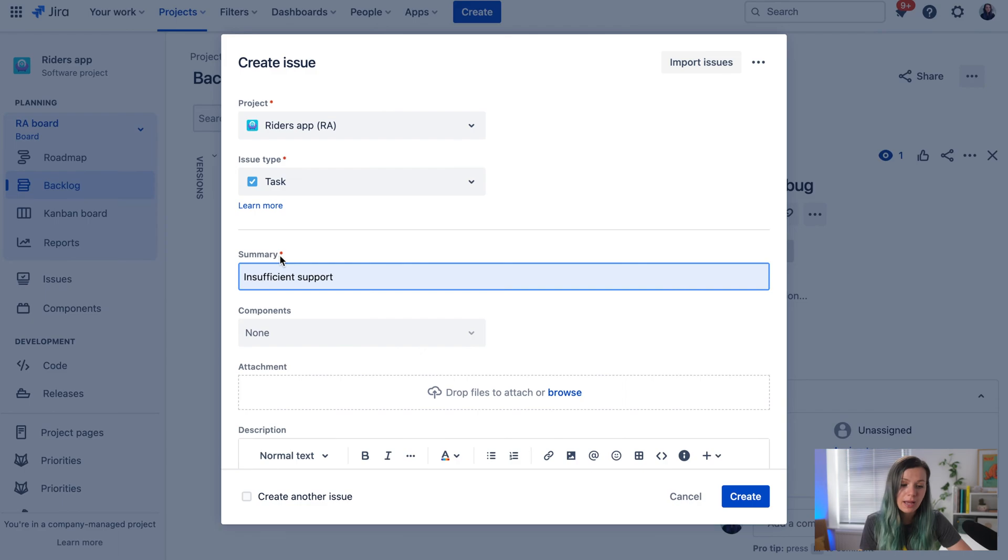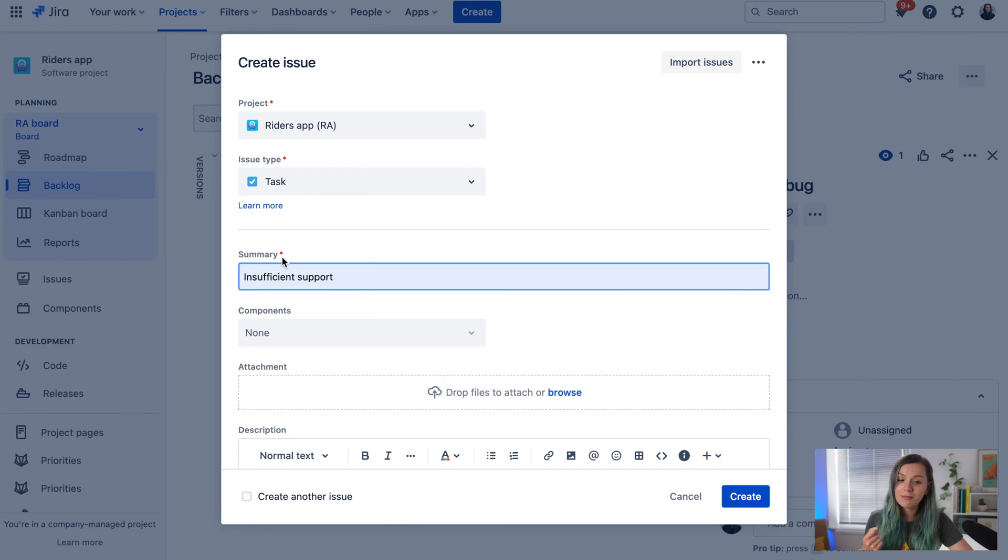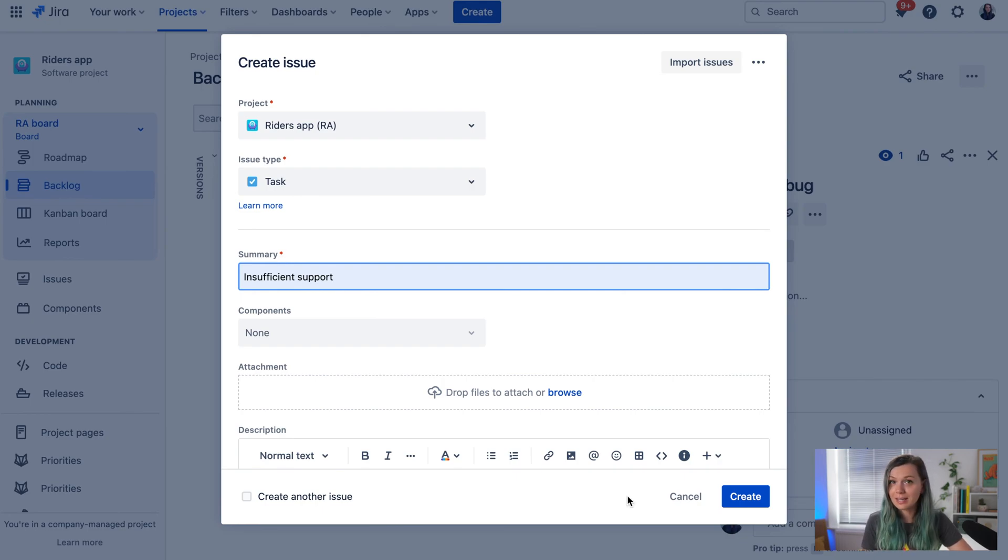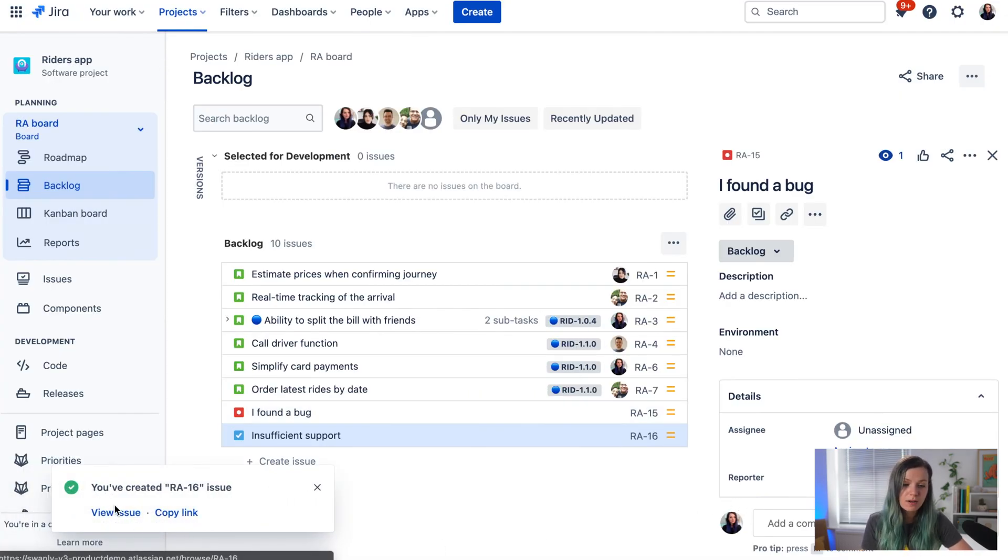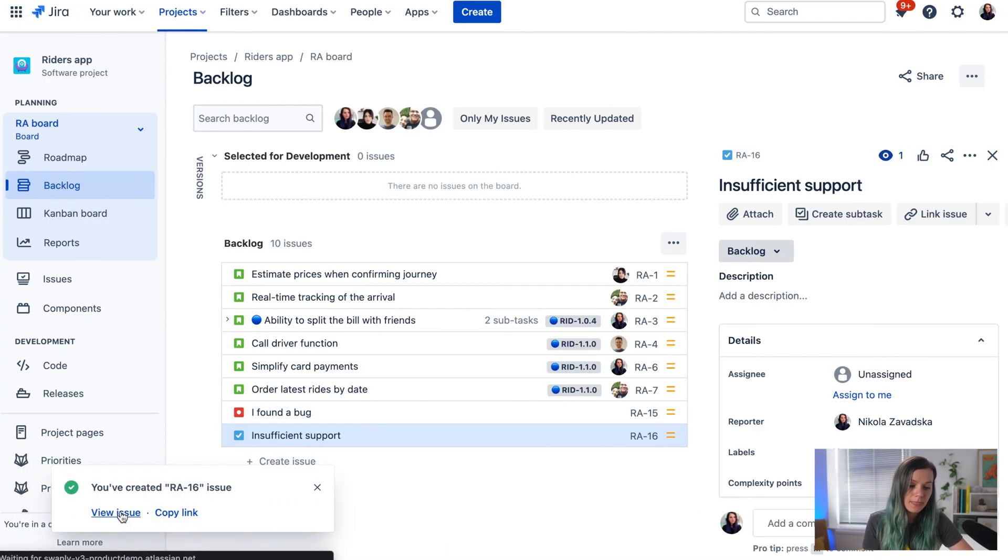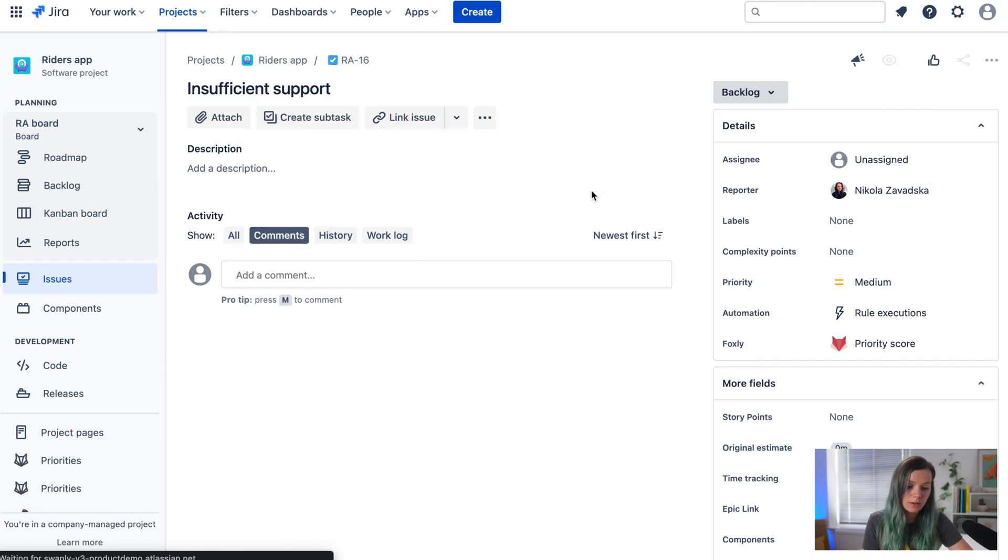Fill out additional information if you'd like. Again, anything with a star is mandatory, so you must fill it out or JIRA will prompt you that you can't create the ticket. Then click create and you'll get a notification at the bottom.